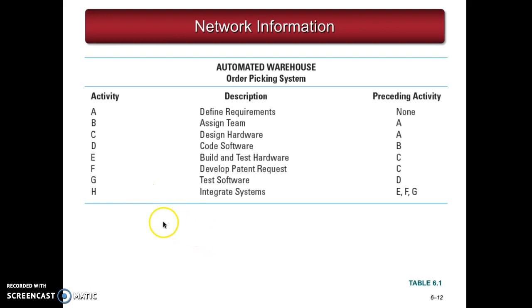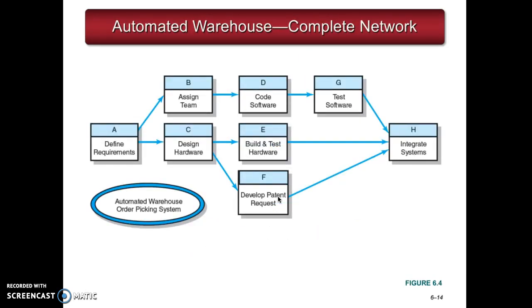So in general, to create a network diagram, you would already have the work broken into unstructured tasks, all with unique identifiers. What you have to do is discuss among your team members what the preceding activity is for each task. Once you have the relationships identified, you can put them in the chart, and then you would have a project network diagram.